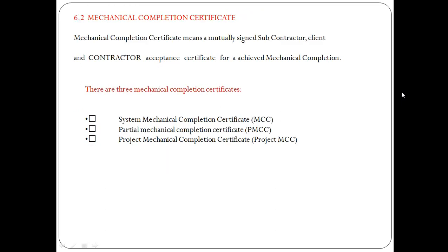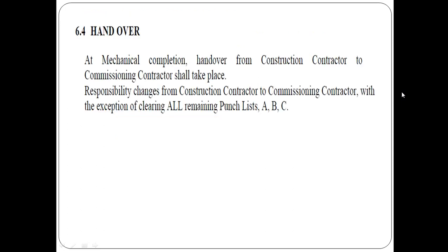Here we have the mechanical completion certificate, what it means, and what the types of mechanical completion certificates are: system mechanical completion, partial mechanical completion, project mechanical completion, and what is meant by each one. Here we have handover. What is meant by handover? So once you read the word handover in the project, you understand what it means.